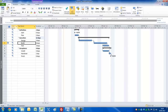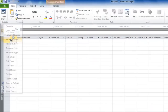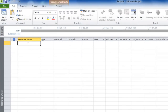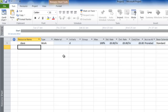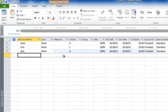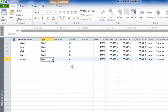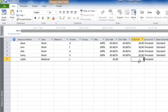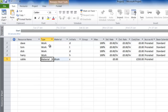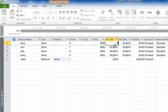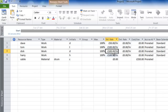Let's now set up the resource pool. For this we need to go to a view called the Resource Sheet. We'll enter the resources: Dave, Tom, Dick, and Harry. Just to show you, you can put non-human resources in — let's have 'Cable', set this to Materials. Materials don't have calendars when they're available. We'll set a cost per use of £350, and type 'drum' as the material name. For Dave, Tom, Dick, and Harry, we can set their costs: Dave as £50 per hour, and the rest as £100.